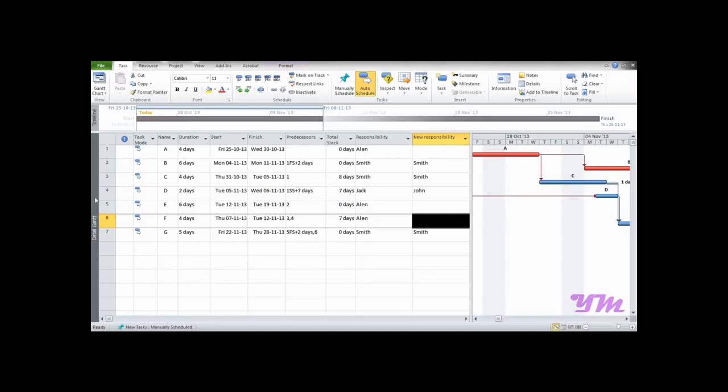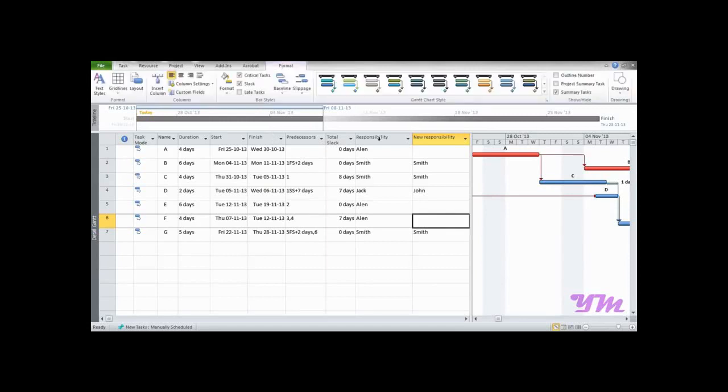So as on the screen you can see this is the project, and if you want to know for how many days the project keeps on going, then you need to sum up all these days. So Microsoft Project itself can do it and display on the very first row of this table. To do that, go on to format and click on project summary task over here.